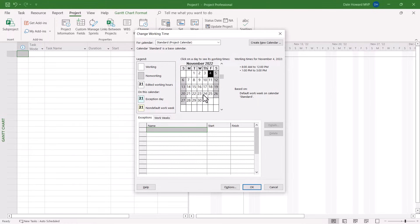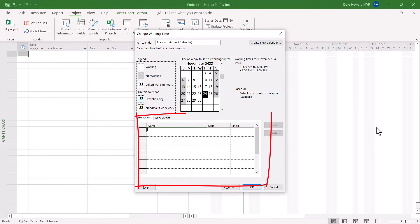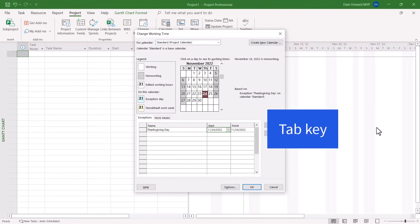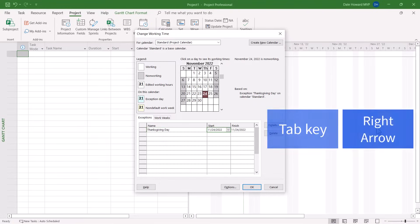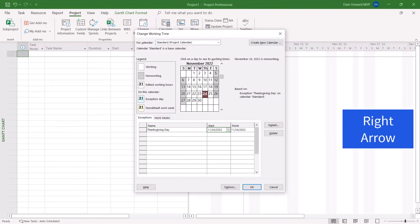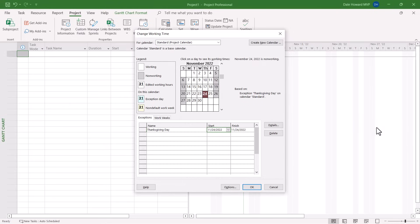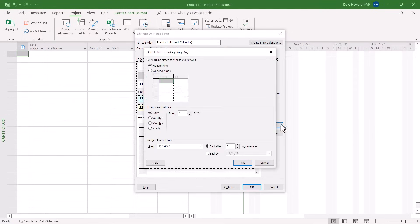For me, that next holiday would be the U.S. Thanksgiving Day holiday. Then in the exceptions grid at the bottom, enter the name of that holiday, press the Tab key, then press the right arrow key to select the start date for that holiday. To make the holiday recur multiple times, click the Details button to display the details dialog.